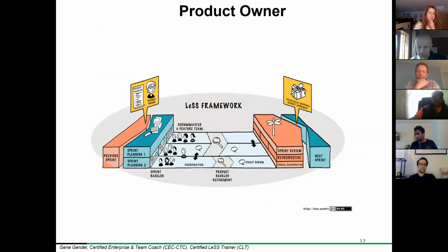And of course, this role right here, one of the two key roles of today's discussion, is the product owner. Now, important, please remember this. In large-scale Scrum, there's only one product owner. We may have between 2 and 8 teams, depending on your product definition and product width, but only one product owner. And of course, the immediate knee-jerk reaction comes: how can one person manage all teams? Or what are the verbs that we hear sometimes? Manage, support, facilitate, coordinate.